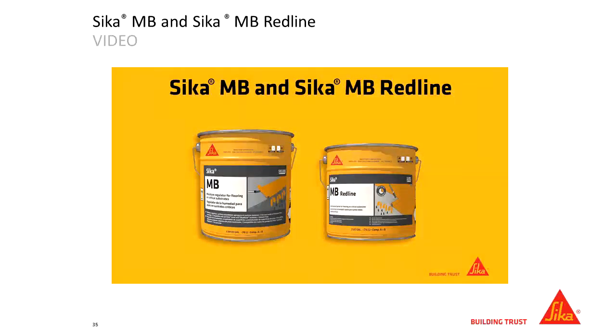Okay, that's the video. I hope everyone was able to see how the product is applied, how it's mixed, the ease of application. Again, they just use a 3/8 inch nap roller there and just roll the product out. Typically what we tell installers to do is to tape off about 300 square feet so that they can see the spread rate, they can see the thickness of the film they're laying down, and once they get comfortable with it, they have a better idea of how the spread rate is. They don't need to keep taping off 300 square feet. But that's a good guideline.